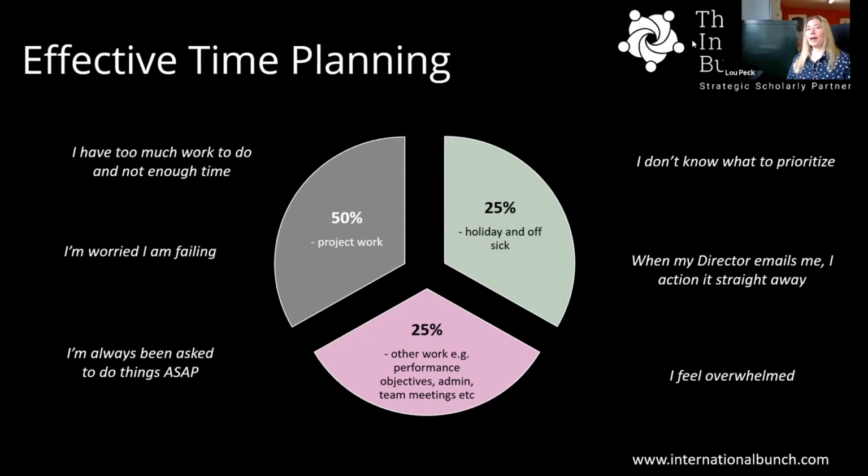And they go, yeah, I can. And then when you come to the end of the month and something else popped up, or they weren't very well, or they had a holiday, and then they suddenly realized that they could not achieve and do the work that they thought they were going to do. So imagine you had 20 days of working. So use this equation here, you only end up with 10 full days of actually being able to do work. So it's about learning what is realistic.